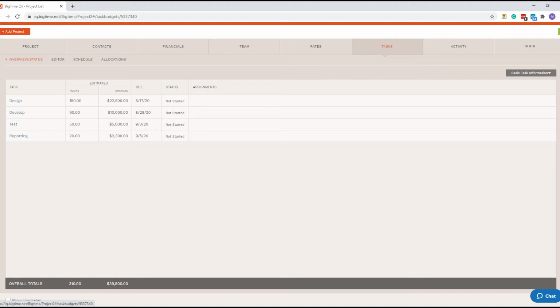You'll get one email that will list every project that hits a threshold. So say it hits 50% of the budget, 70, 90, or 100. You could just set those thresholds and get an email reminder, or some clients prefer to start their day off taking a look at some budget status by task reports. Not only is this information great for leadership, but for project managers, it can be set up so they only see the projects that they're the team lead of, and they can really have an idea of the health of their project and where everything is at.